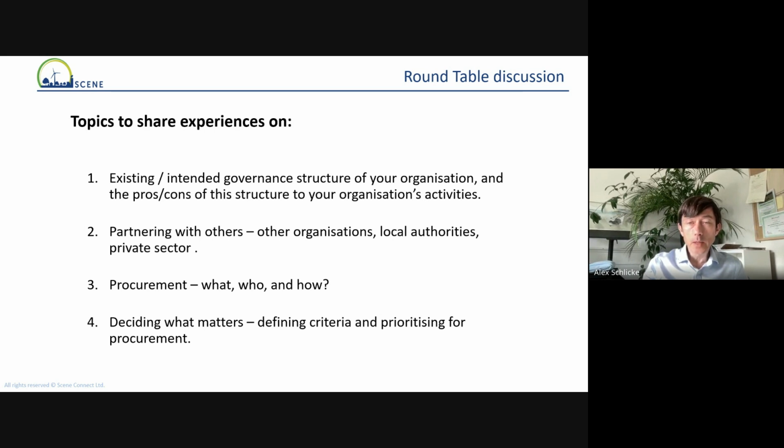So there are some that would be eliminated as just not appropriate if you were following certain routes. Like I just said, if you were wanting to sell energy, then you would have to not go down a sort of charity route. But the other thing to emphasize is that you don't need to have the final governance structure in place until you need it. So for example, just going back to that Iona example, they started out as a steering group. There was no entity.